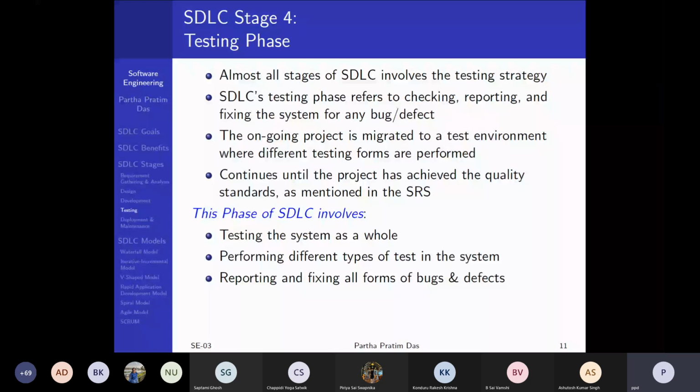And then you report these in the form of bugs and defects, and it goes back to development to make the changes. And if you are unfortunate, it might go back to design. You might find that your design itself was faulty, that this interface is faulty by design. If you are very, very unfortunate, it might go back to the requirements. You might discover that you are suddenly stuck with a situation where you have a contradiction in the requirement specification itself, or things like that.